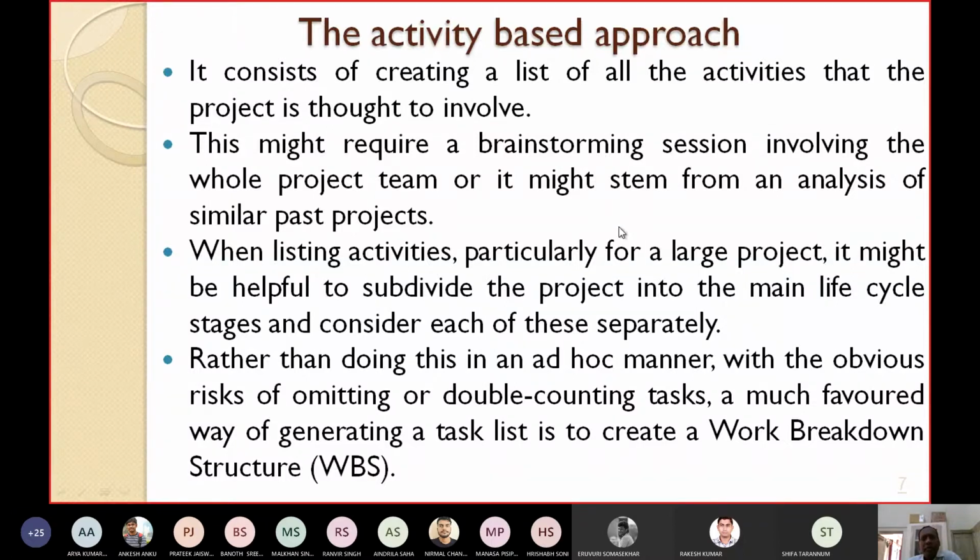When listing the activities, particularly for a large project, it might be helpful to subdivide the project into the main life cycle stages and consider each of these separately. This is a hint that is given to you. You can decompose the project into the main life cycle stages, and then consider each of these separately. Then you go on dividing each activity separately.